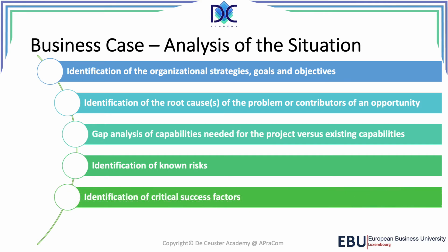We also have to look at the critical success factors. It's very important to define success very early in the project, and that will also be part of the charter, where we have to define when our project is a success. It's very important to define it very early because then you have a basis for evaluating the success of the project later. If you don't have it, at the end of the project you can start discussing whether this project is successful or not. I had cases like that when people stated, that is what you have to do. I did it and somebody else didn't agree with it.